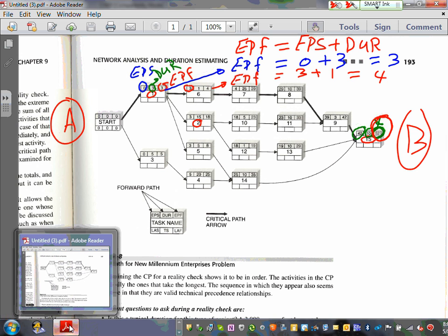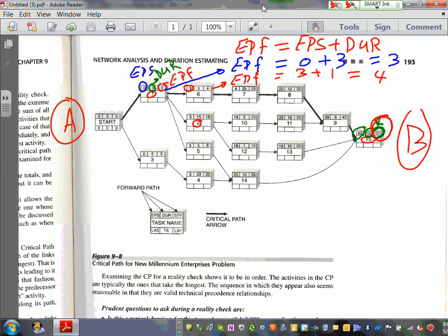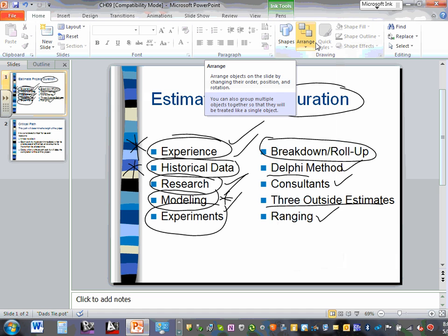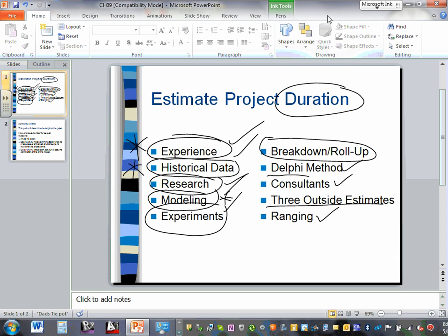So here are my activities, Adam. These activities, I divide them based on historic data. To start the project, it takes 3 weeks, right? Based on this type of project, historic data, or from McCormick or whatever. So they get these numbers. Am I making sense, guys, where you get these numbers? Then you plug them in for each activity, and then add them up, and at the end, you end up with 52 weeks to finish this project. Gentlemen and ladies, any comments, guys? Any questions about the duration of the project?